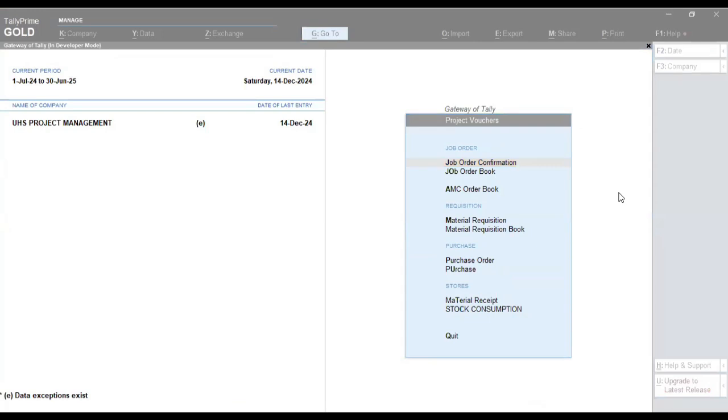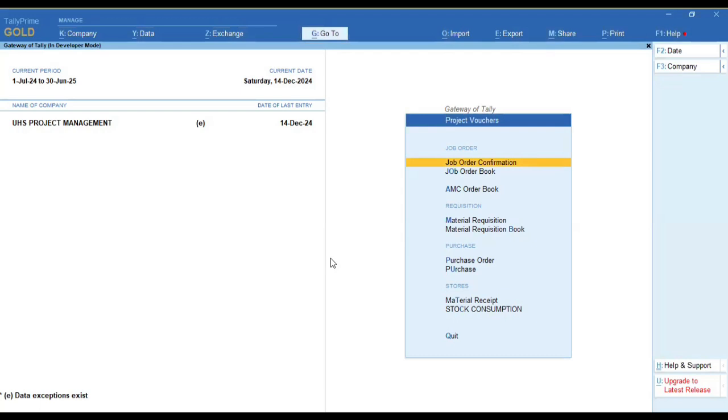So what you're saying is we have made a consumption of various materials. Then after that, you are trying to allocate it to specific projects, is it? Is that what you've done now? So there are two different processes. One, you receive material to your location, then you transfer to your project location. Sometimes, instead of receiving into your main location, they go directly to the project location.